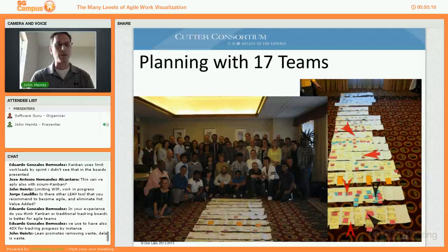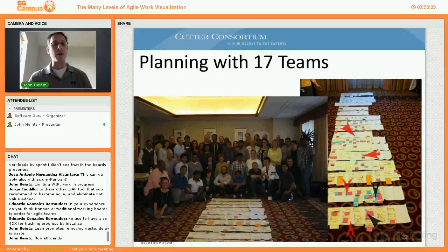The tool that I would recommend, not a software tool necessarily, but an approach or strategy tool, would be flow efficiency. Flow efficiency is how much of the time that work is in progress it is actually being worked on. One way of looking at that is to measure how much touch time we actually do work against all of the clock time. If a card is on the wall in progress or code review or some state for a week and then it's released and done, and people were working on it for 2 full days and a half day and the rest of the time it was blocked, then it was blocked for about 2.5 days and worked on for about 2.5 days. That's actually a 50% flow efficiency.